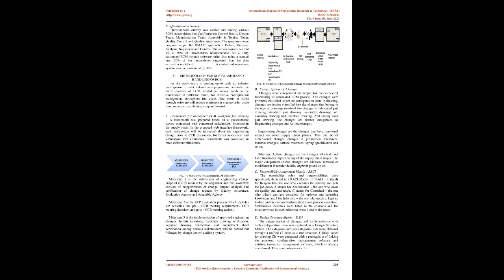D. Configuration auditing. Configuration auditing is the process to verify that the configuration management system is efficiently functioning. An engineering change proposal, ECP, is the management tool used to propose a configuration change to a configuration item, CI, system's baseline performance requirements and configuration documentation established during design and development of the system.